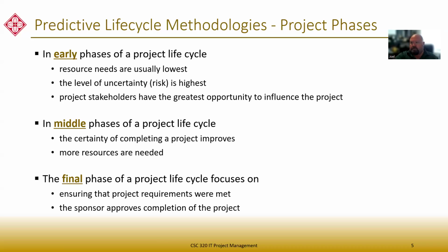Why? Because you'll see a little bit of a slope where at the beginning, resource use is really steady and low. And in the middle, we start ramping up. Why? Because this is where we're doing all the heavy lifting, right? And then towards the end of the middle, we're finished with most of the work and our resource usage drops off again right at the end.